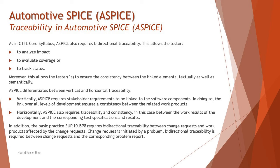In addition, the basic practice SUP.10 — the support process — requires bi-directional traceability between change requests and the work products affected by those change requests. Traceability is not limited to existing work products and test basis. If any modification or revision is made to an entity, that revision should also be mapped to the affected work products. This shows whether existing test cases are sufficient to support the change or whether new test cases are needed. Bi-directional traceability is also required between change requests and the corresponding problem reports, ensuring 100% coverage and that nothing important is missed.